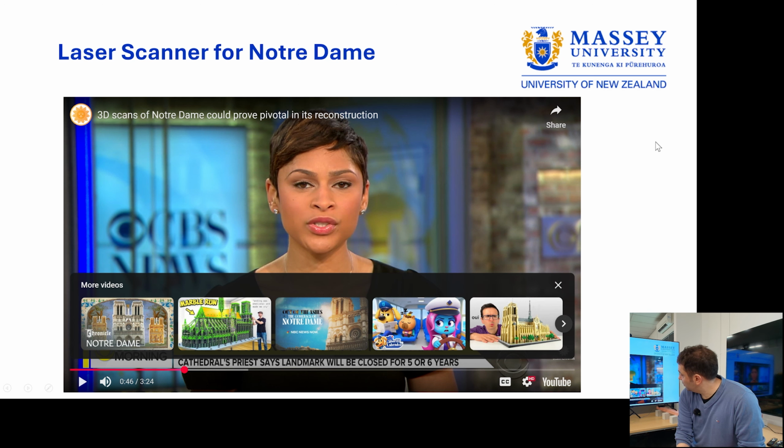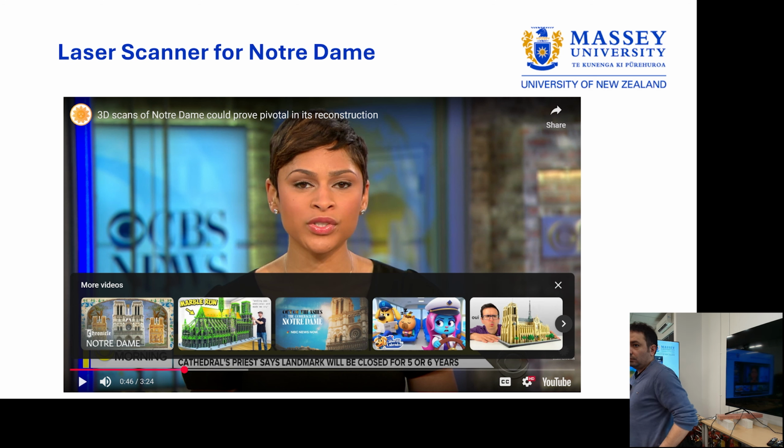Let's go. Rino, maybe just think about when you do your site, the closeout phase for the client, when you have to hand over all the manuals, all the as-built plans, all of that. If you have a 3D model as well that you can provide the client, that's like a plan in itself. That they can keep, and if they need to upgrade or change or replace something, they go back to the 3D model.